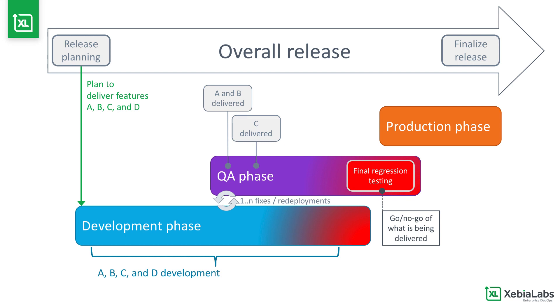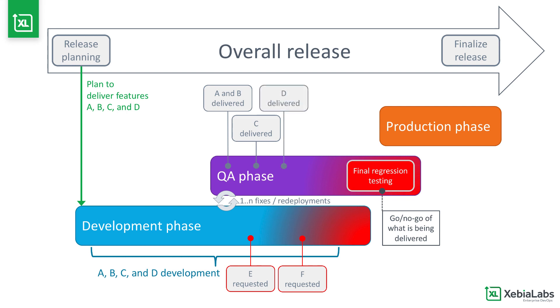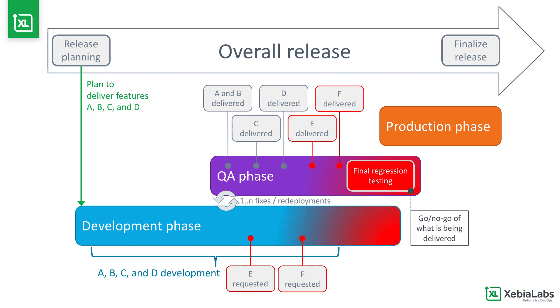Predicting the delivery of features is also hard when work that was not originally planned is inserted into the release. This work includes hot fixes, patches, urgent fixes for features that were deployed in the last release, anything that impacts what the release will actually contain and, potentially, the timeline for delivering it to production.